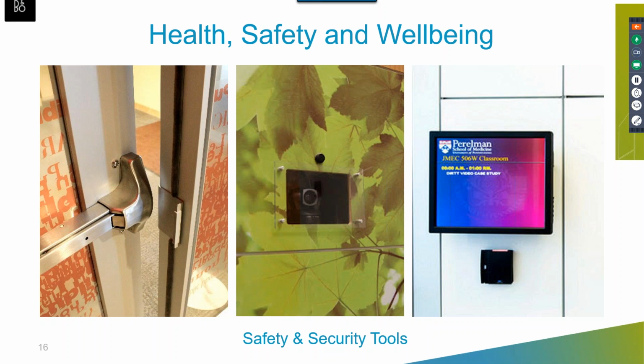And the nice thing about this approach to construction is that wherever you see one of those reveals on a tile behind that card reader in particular, or under that camera, that's a place where a tile can be removed. So even if the choice of security tool comes along later, there is an opportunity to install it in an active environment, because the noisy part is maybe routing the hole in the tile for the camera or attaching these tools to it. And that can be done very quickly, very quietly in a remote location, with the tile then brought back to the space with the appropriate power brought to it. So these tools don't need to wait to be installed for a significant break period. They can be installed in an active environment or in just a few hours over the course of a week.